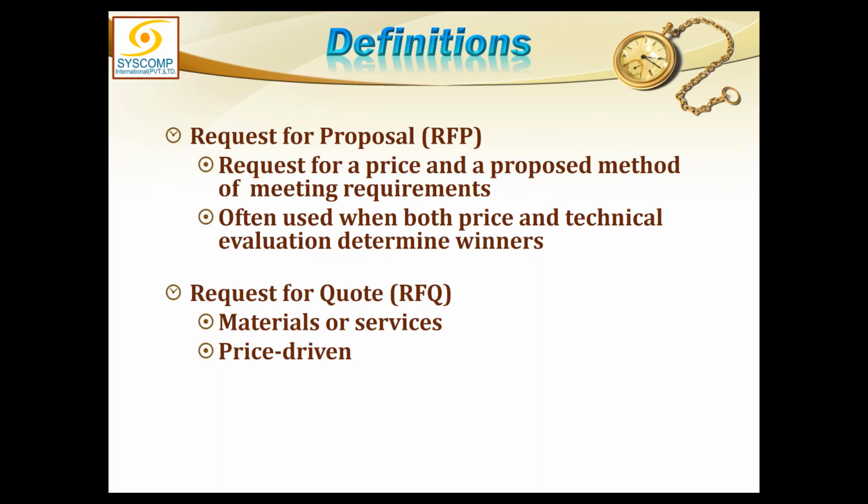But if I know that I need an AC installed of this much capacity, and I even know the name and model of the AC, then there is nothing else to do except a request for quotation. I'm sure what I'm buying, so I'm asking who can provide it cheapest to me. So an RFQ is normally done for materials or services, and it is price driven, and it is normally for those things for which the scope is not changing very much.